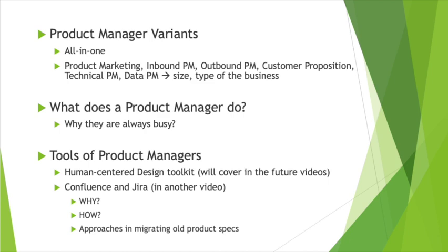So I can talk about how my team does it. We do a kind of rotation to sort out this problem, and when we do the 2 week sprint, it's more about the development and testing time. But for analysis and design, we don't consider it in the 2 week sprint. We do it outside of the sprint cycle.